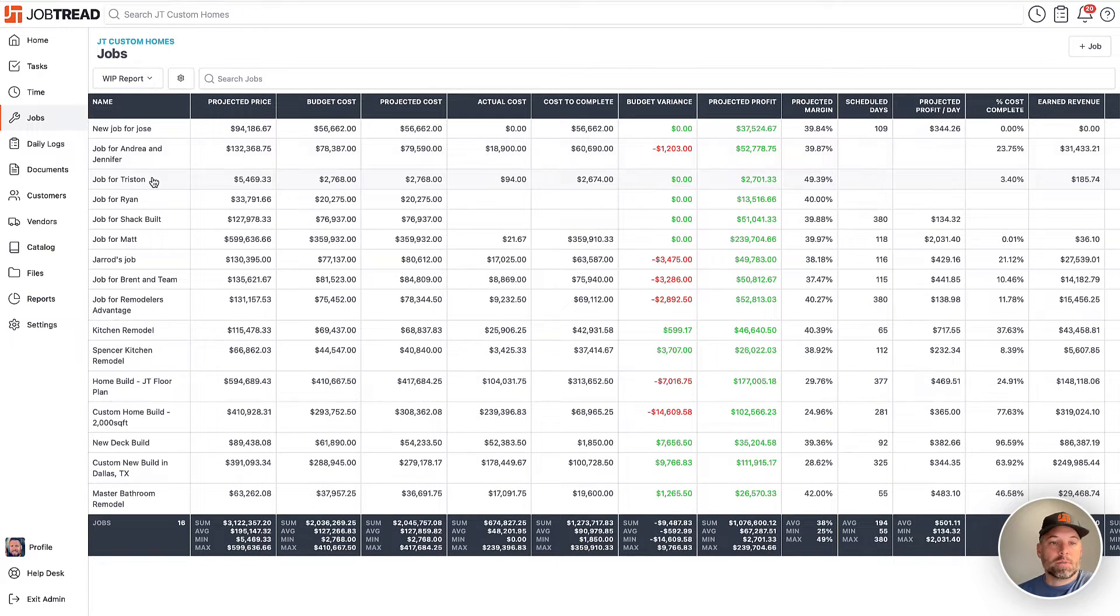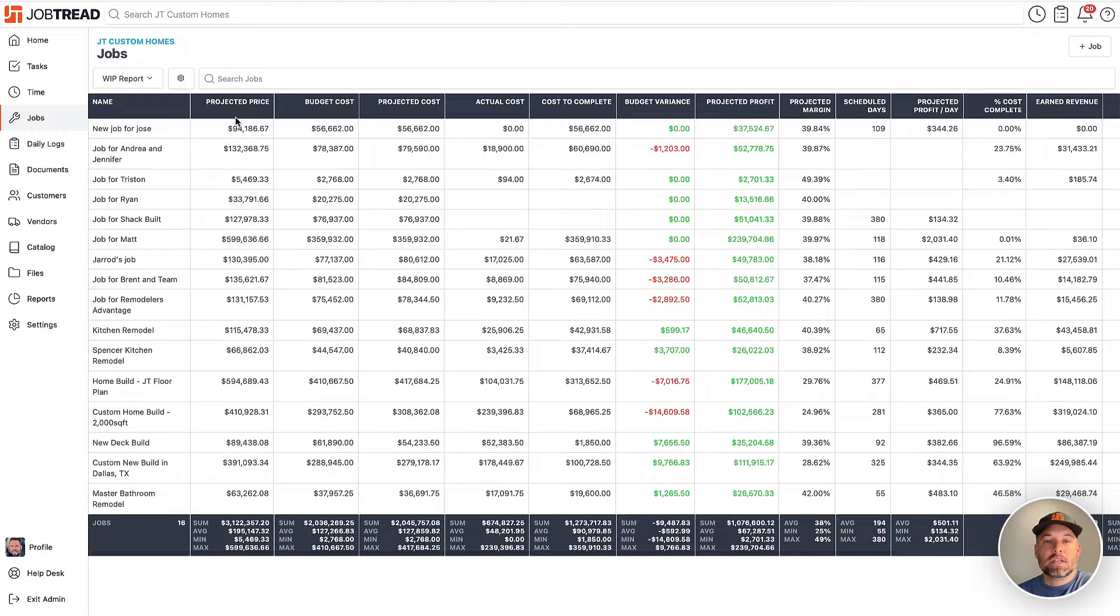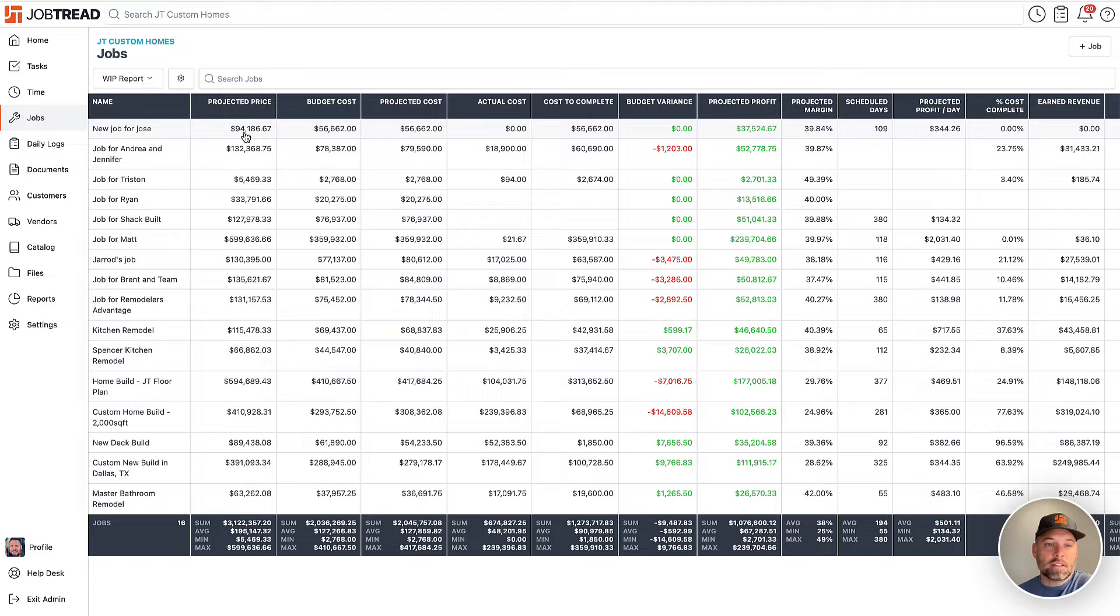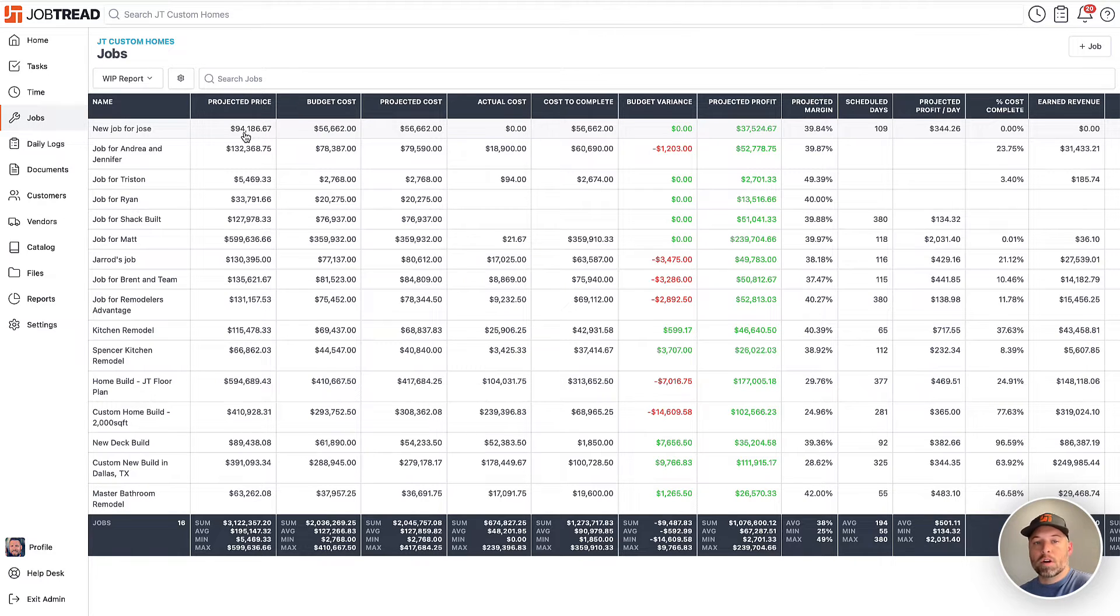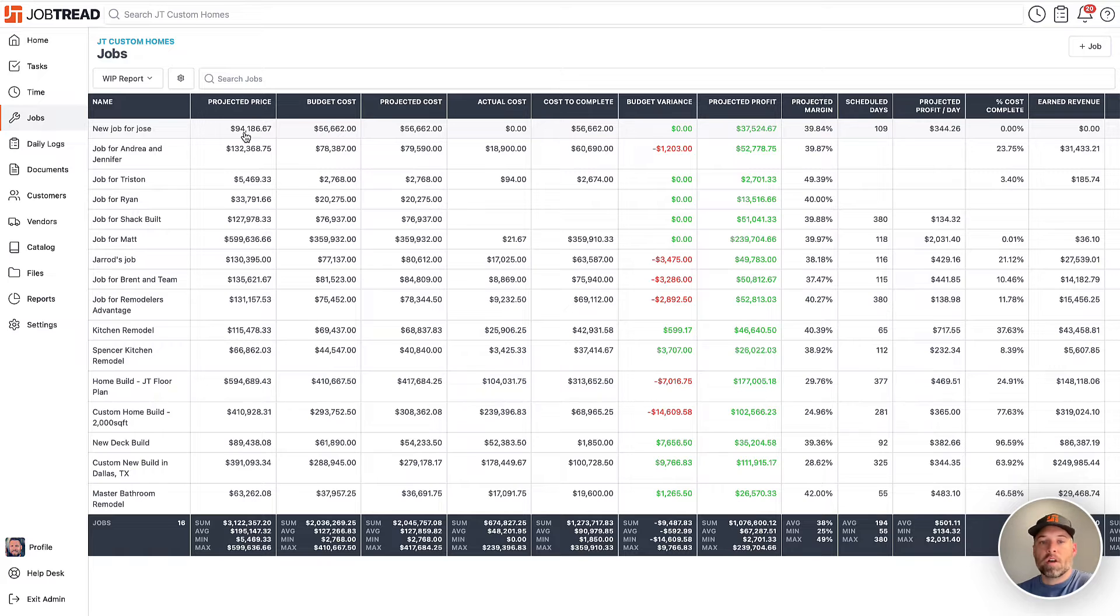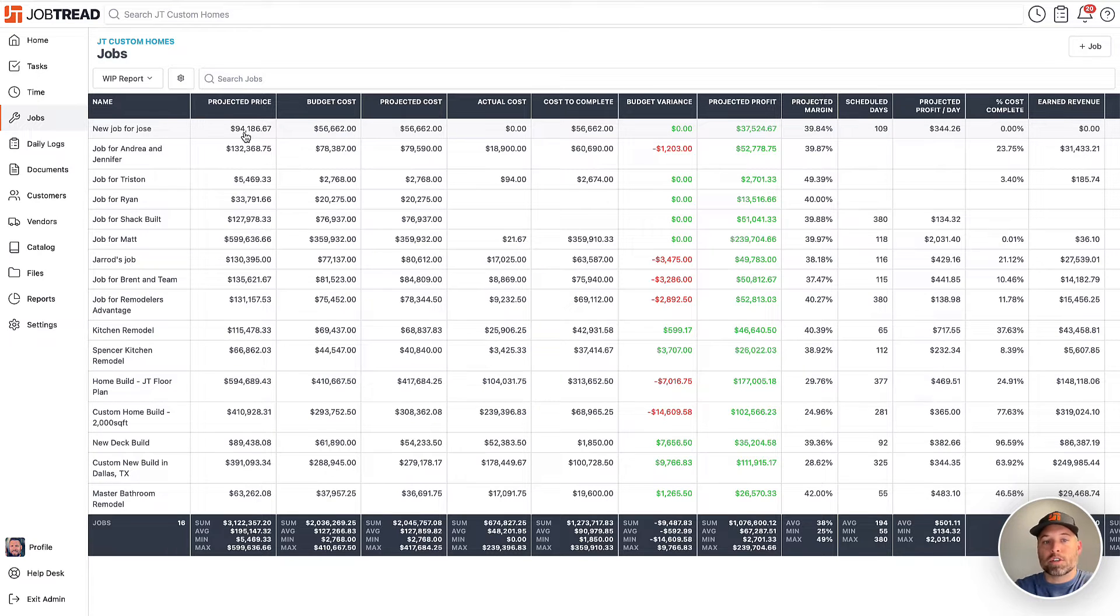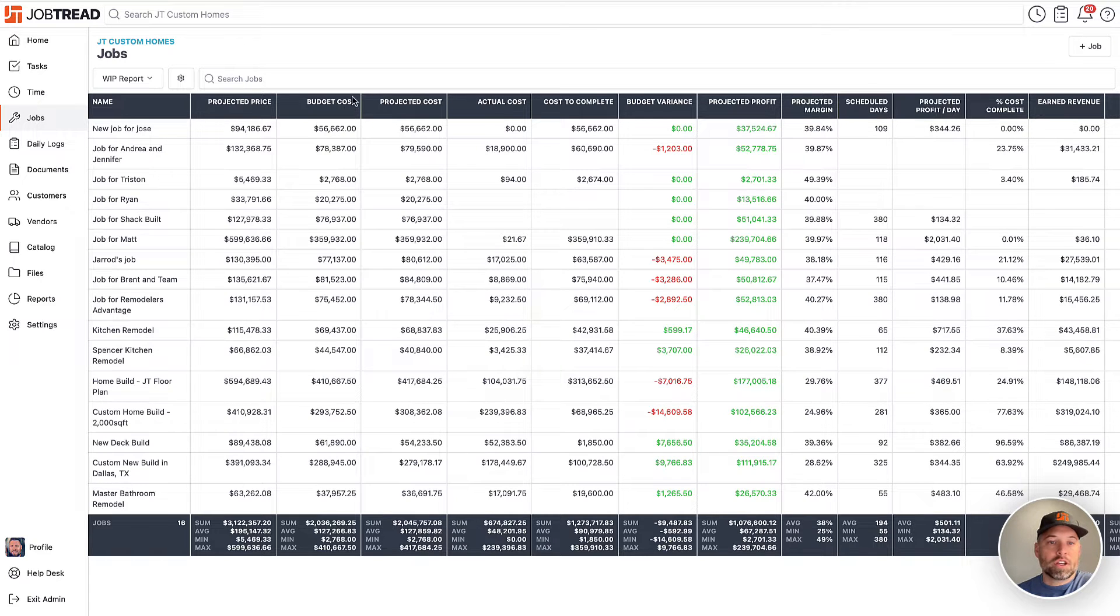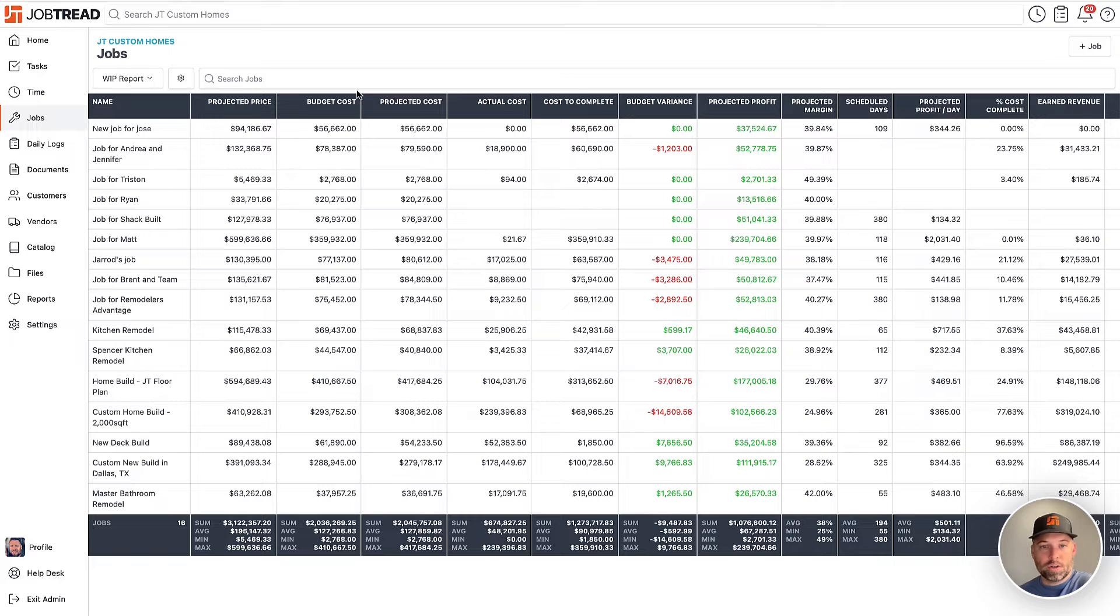Along the left-hand side, we see a list of jobs, and then we see some familiar financial data points. So let's start with this projected price. It doesn't read approved price because this also accommodates cost plus projects. So if you have cost overruns on a cost plus job, that would increase the price the customer is going to pay, which is why it reads projected price. From there, we have our budgeted cost. This is our original budget, what we intend to spend.